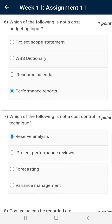Question number six: which of the following is not a cost budgeting input? The correct answer is performance report. Performance report is an input for cost control, not cost budgeting.